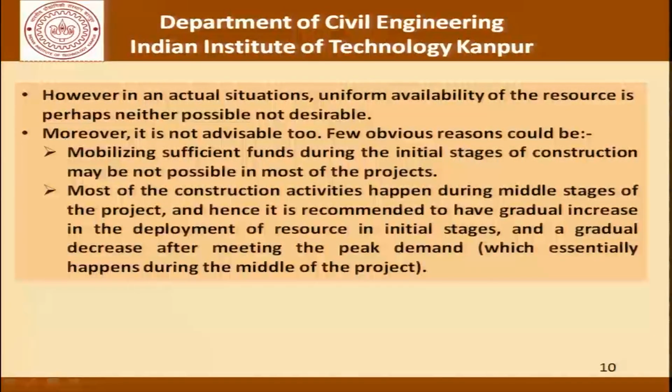Few obvious reasons could be: mobilizing sufficient funds during the initial stages of the project may not be possible in most projects. Most of the construction activities happen during the middle stages of the project, and hence it is recommended to have a gradual increase in the deployment of resources in the initial stages and gradually decrease it after meeting the peak demand, which essentially happens during the middle of the project.